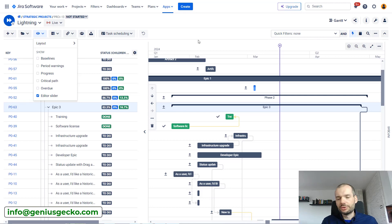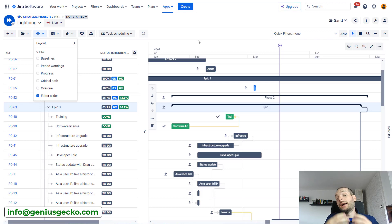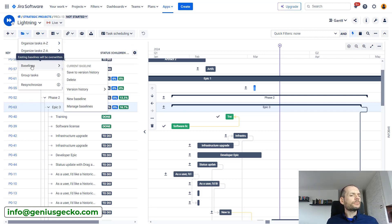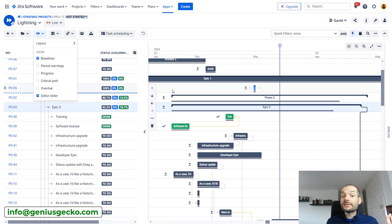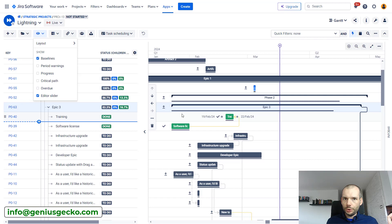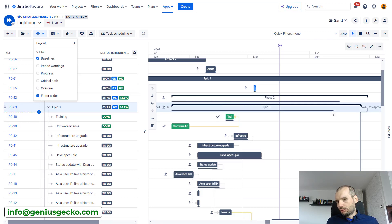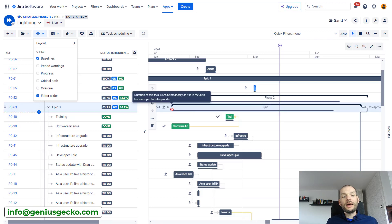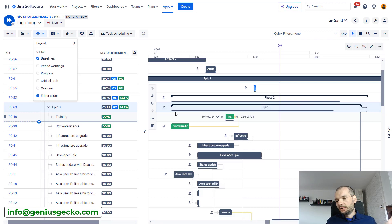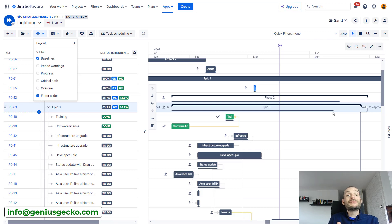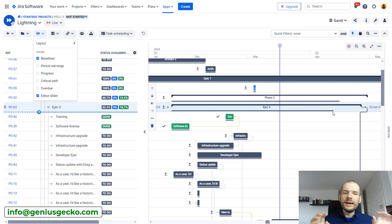If you've used Big Picture previously, or really any other project management tool, you know what a baseline is — basically a snapshot of start and end dates of all the tasks in your plan. In Big Picture, you could go to the Gantt data menu and create a new baseline, then enable it in the view. The baseline is represented below the tasks on the Gantt chart as a line, so you can see the drift — for example, Epic 3's baseline end date is earlier than its current end date.